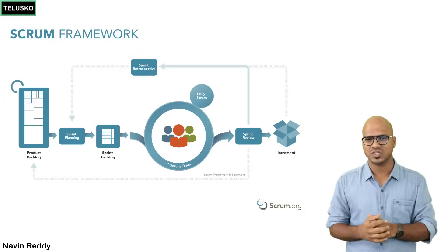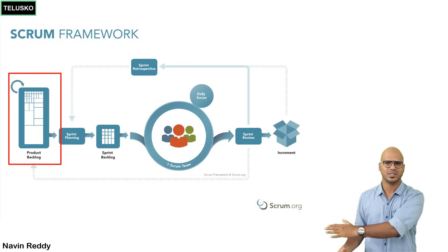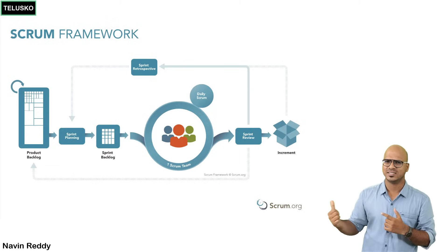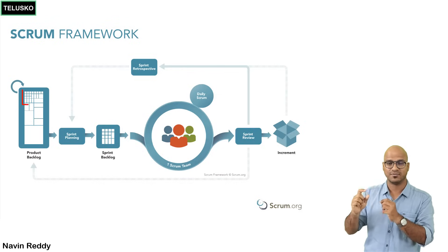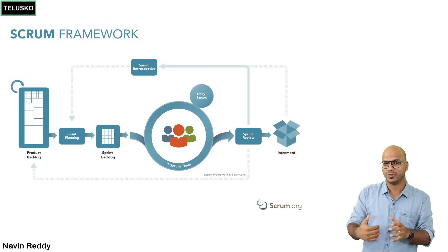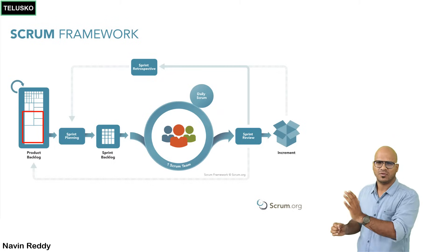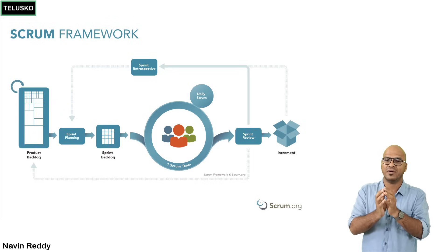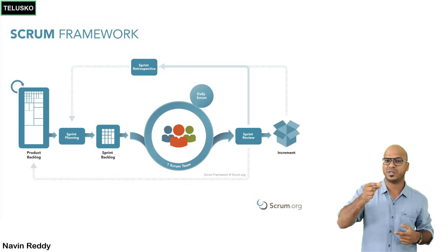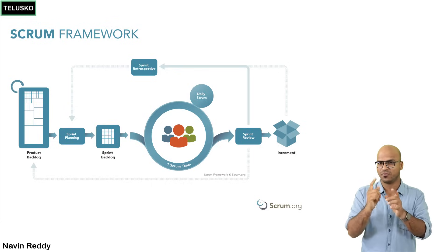The full set of all requirements is called the Product Backlog. You can add requirements to it later — it's not fixed. Large requirements can be broken down for the current sprint while others remain as-is until you're ready to work on them. The set of requirements you can complete in one, two, or four weeks defines your sprint length. Let's say you define two weeks as your sprint.